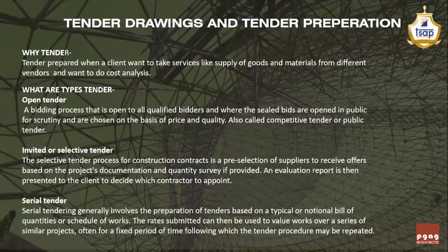And if a particular contractor is quoting very low, then you need to guide the client by saying that the contractor is not paying attention to all the material cost and the required cost of that particular item, and is quoting very low. So that is your role.